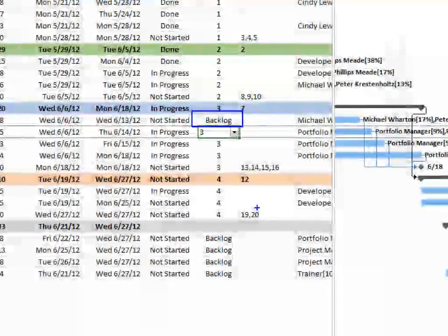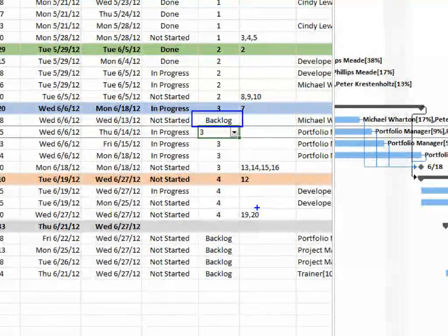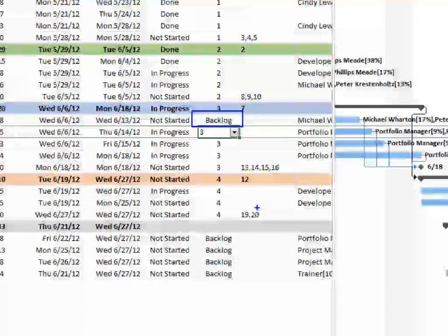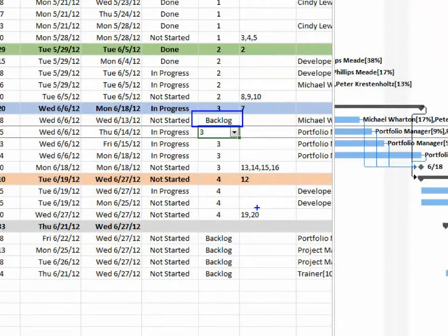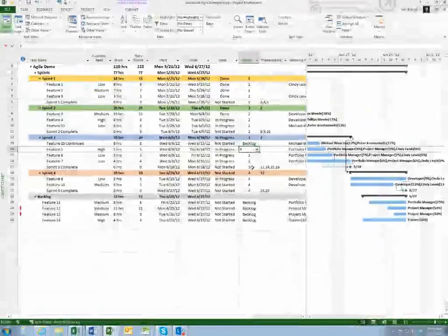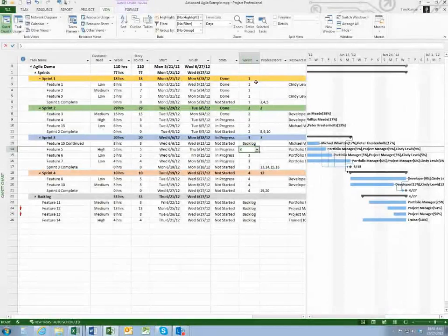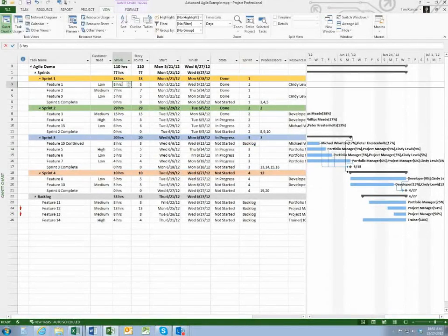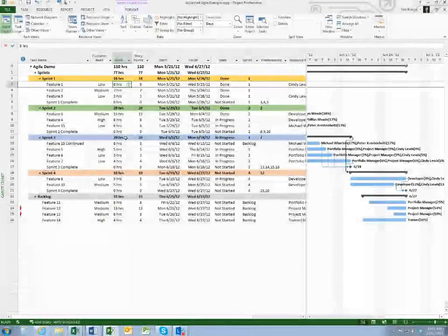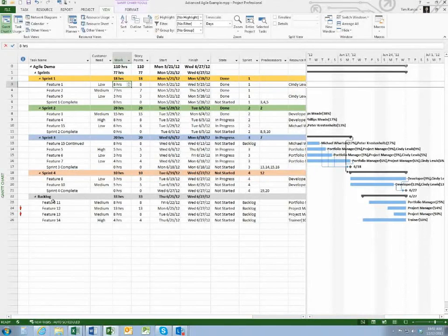Now the term backlog, for those of you that are not familiar with this, again, some of you may, we talk about sprint backlogs and then the overall product backlog, but the idea is that the backlog is kind of the parking lot. It's something that's kind of out there. We haven't planned when we need to start it. I need to hold that in reserve, and if we've got some bandwidth, maybe we can go to the backlog and pull something off there, sweep that into a sprint to see what we're working on. And the idea is inherently I've got some fields that help me manage that.